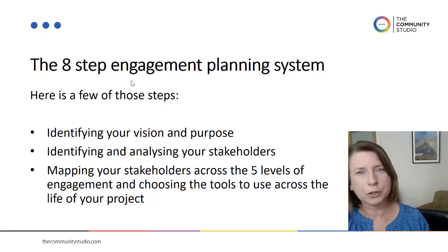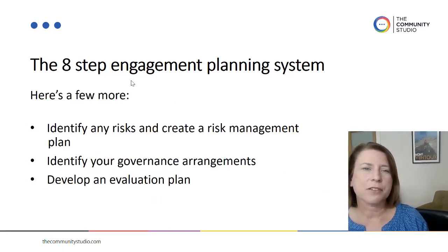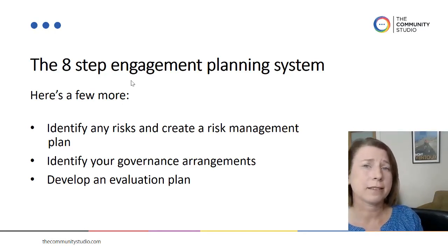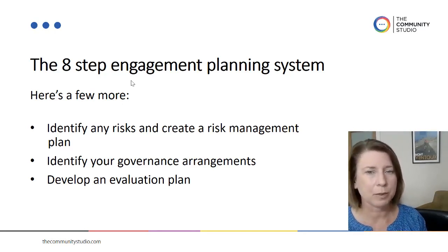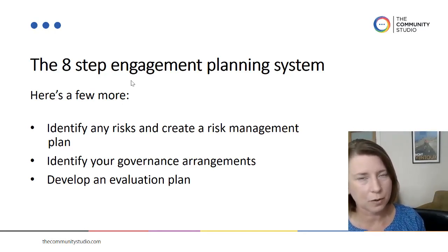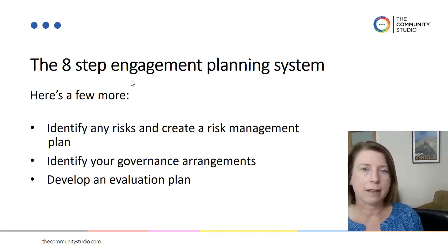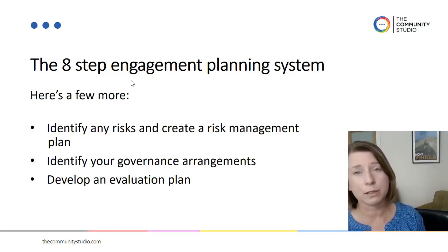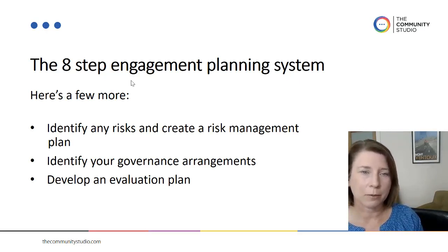All sounds pretty logical at this stage, I'm sure. Here's a few more of those steps. Now, identifying your risks and creating a risk management plan is probably something that you do as part of normal project planning. And I would also like to encourage you to start thinking about people risks. What are your engagement risks when you're doing that project planning as well?